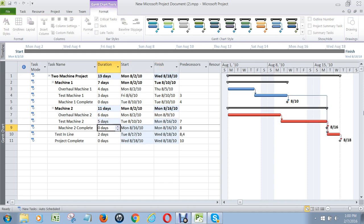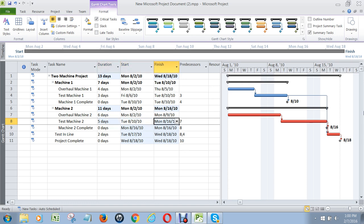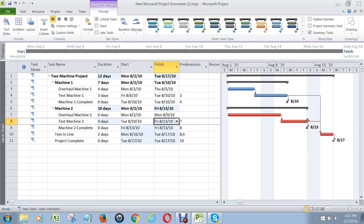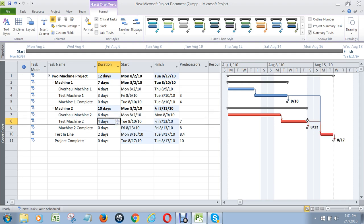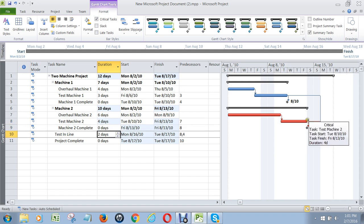Let's make it five then — the 16th. It looks like we're only going to get either the 16th or the 14th, probably because these bars right here represent the weekend as non-working time. However, what I would do is we want to hit that milestone date. So I'm going to change this to four days, and then we'll be done a couple days early and we'll hit the milestone. Remember: if you don't like any of these dates — the project finish date, the milestone for completing machine 2 — you shorten up the critical path activities in order to achieve those milestones. And that shows you how to create a schedule that you can manage.